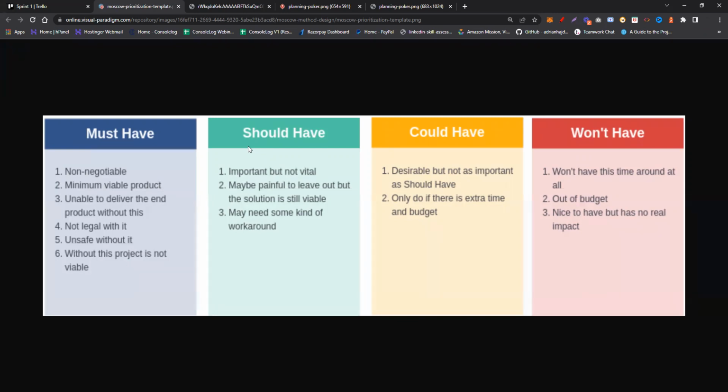Now, this is the part of the Scrum Master. Being a product owner, suppose that customer or user says, it's okay, whatever roadmap you decided, but if you change it a bit in this domain, it will really help. Again, that's the job of the product owner, who has to change the product backlog. That's why for a product owner or Scrum Master, backlog refinement is very important from time to time, so that you can easily prioritize what needs to be must have, should have, could have, and won't have.